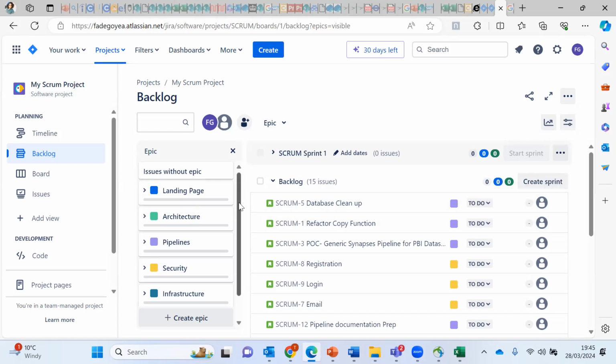Cool. So that means if we are able to get a requirement elicitation from the PO, we shouldn't go into division of them into epic, features and backlogs then, if we are using Jira. If you're using Jira and you get your requirements, you create your epics from your requirements and then you break it down to your stories, which will be your next level. On Azure DevOps, what you're doing is epic, features, stories. So what we're doing now on Jira is epic, then going down to the level of the stories. Yeah? Okay. Thank you.